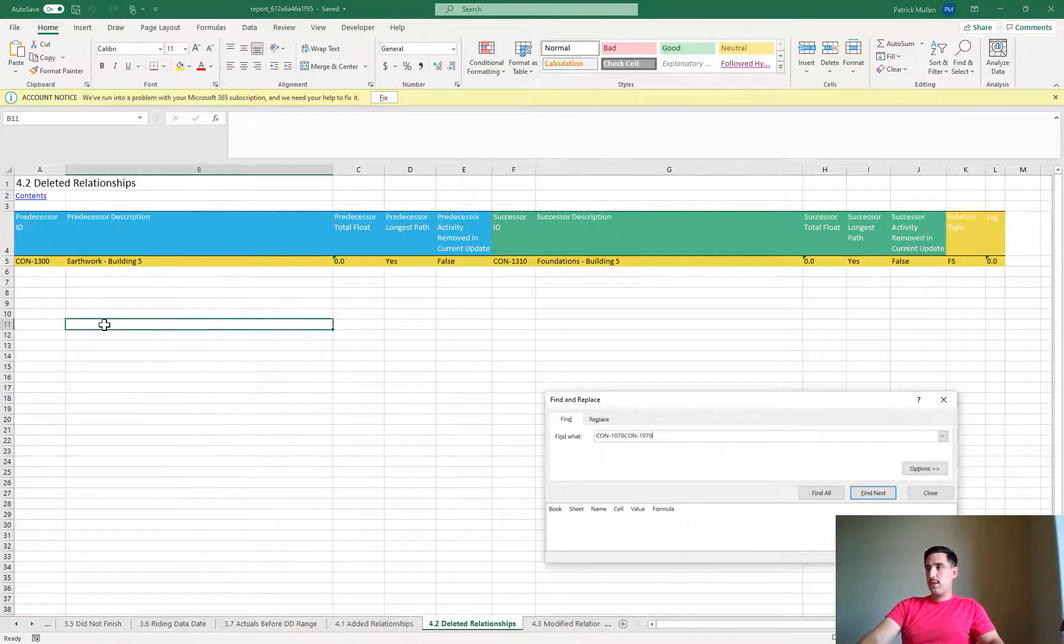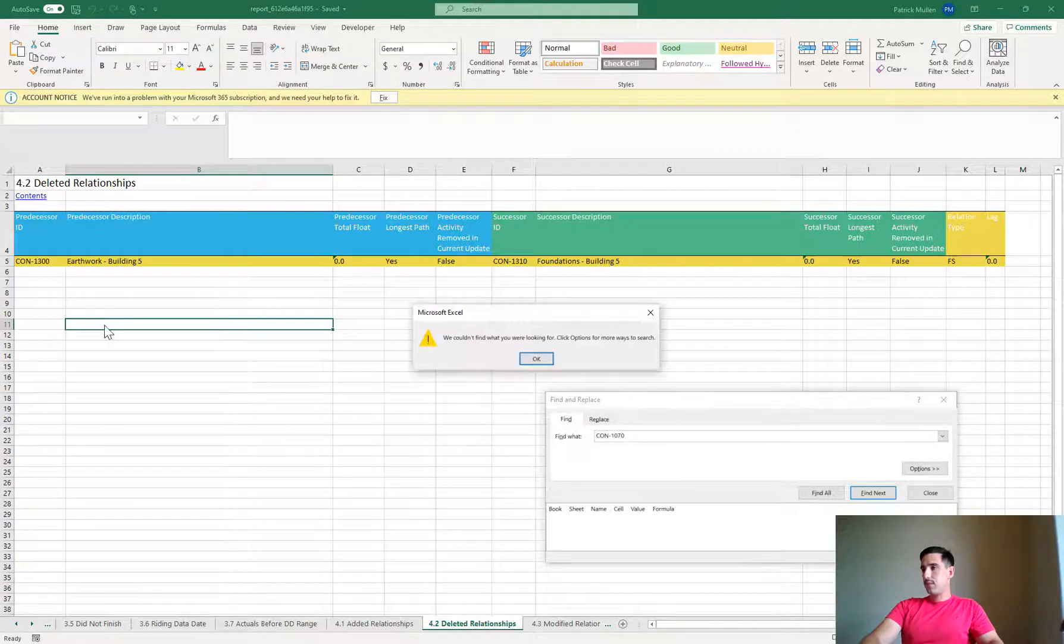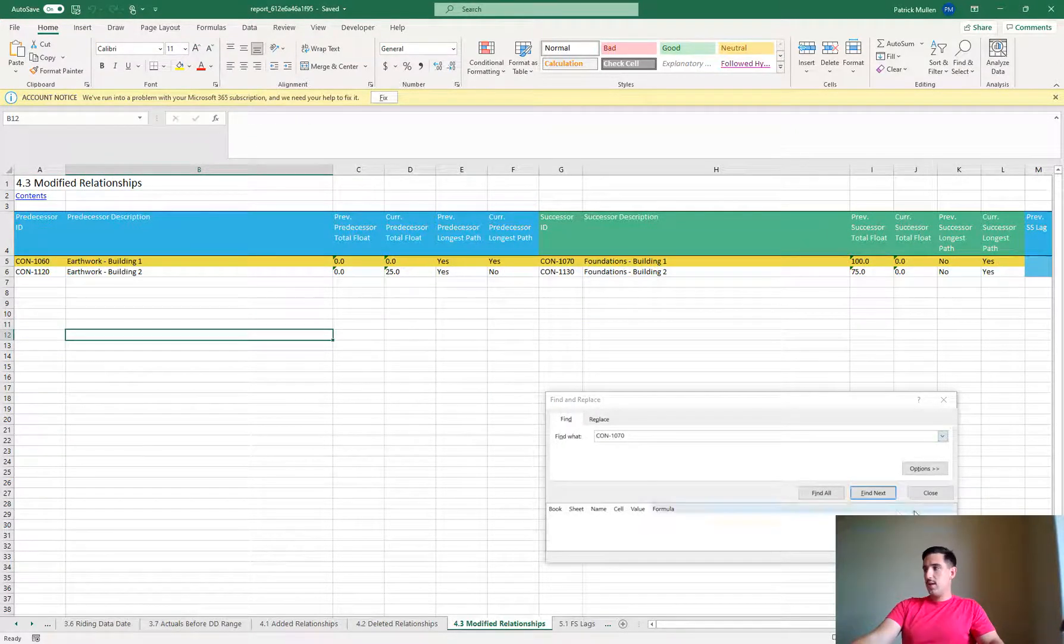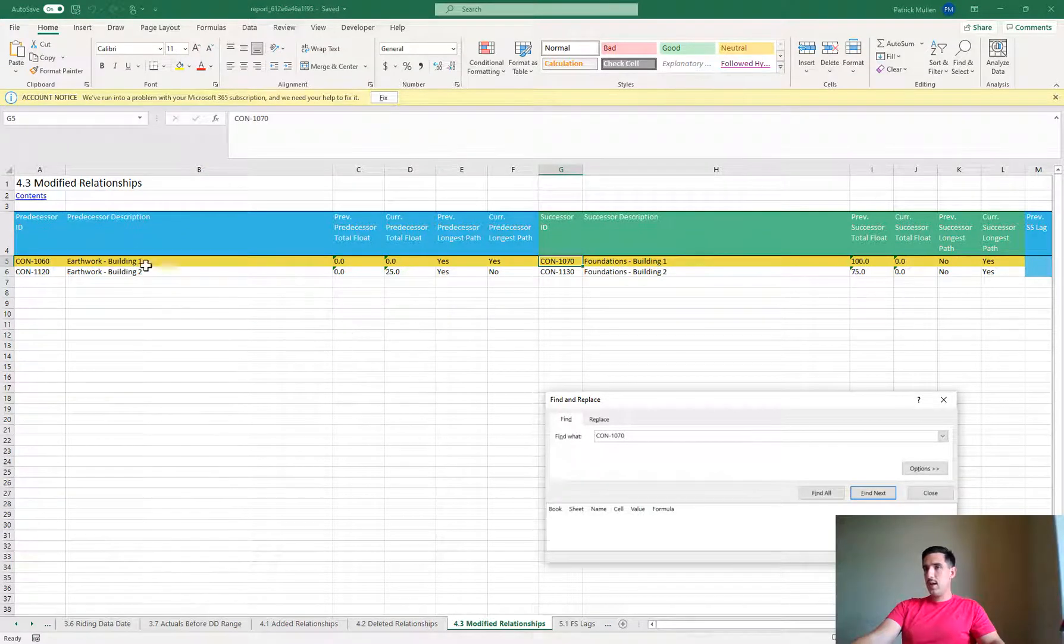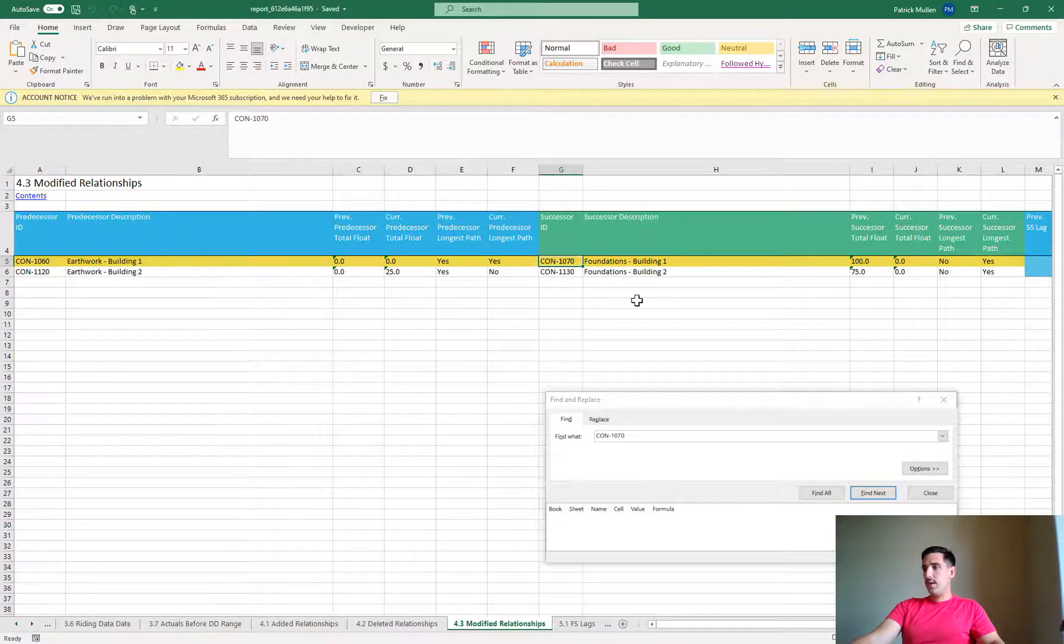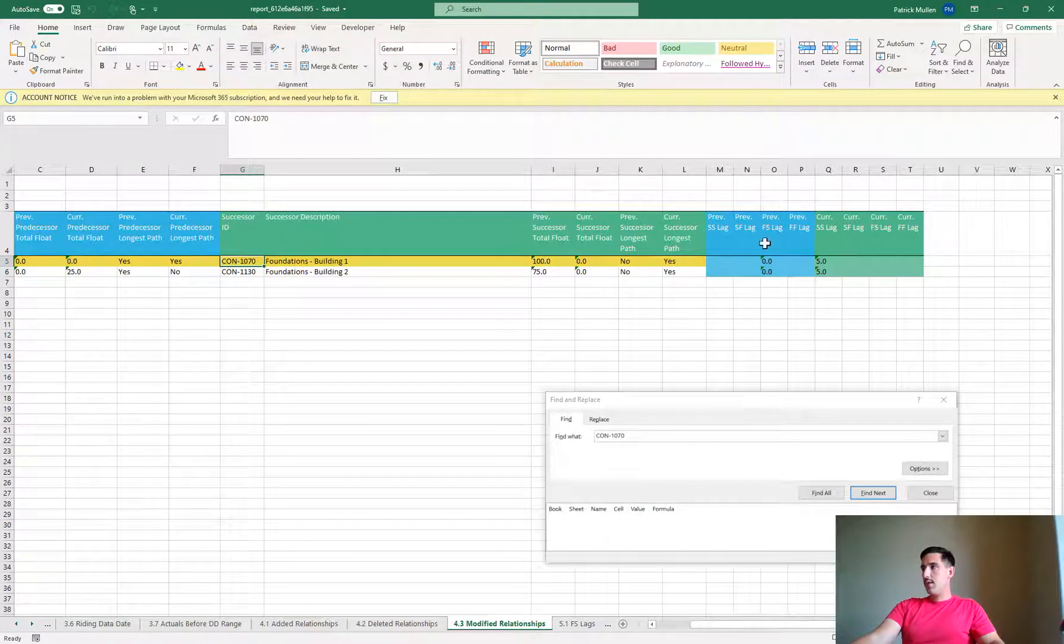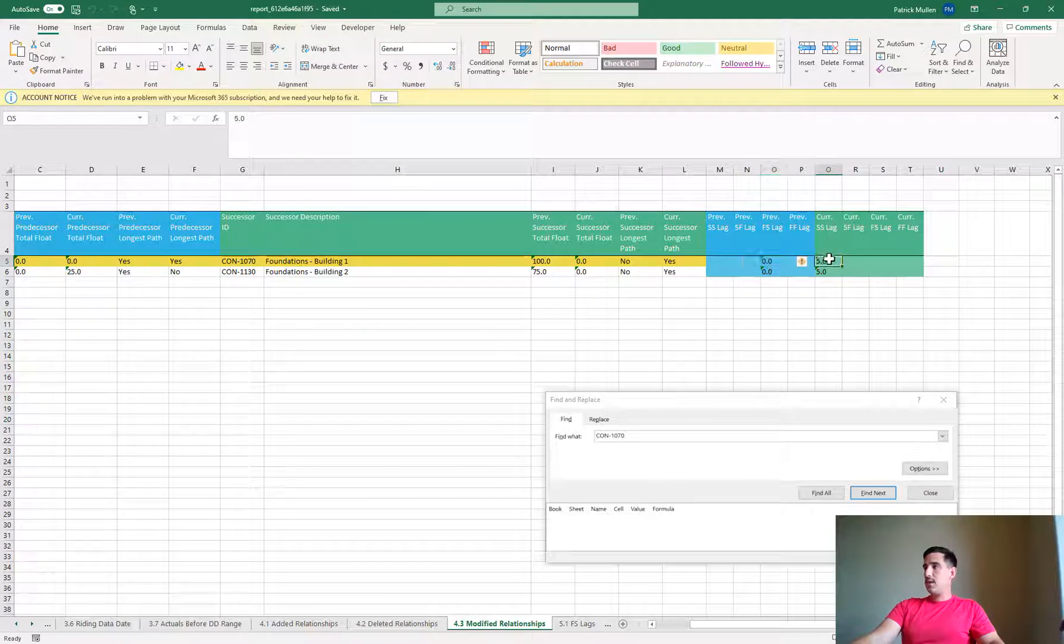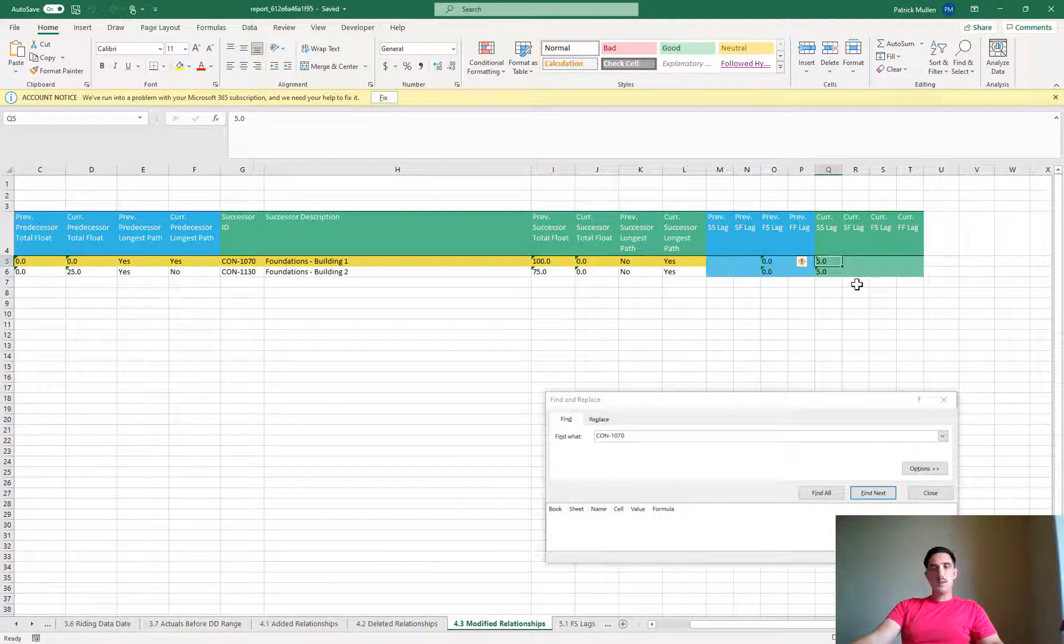I can see it's not under that section but if I go to modified and search for the same thing, I find here that the relationship between earthwork and foundations was previously a finish to start with zero days and now it's a start to start with five days of lag. So really nice easy way to be able to figure out all the changes that took place on your schedule files.